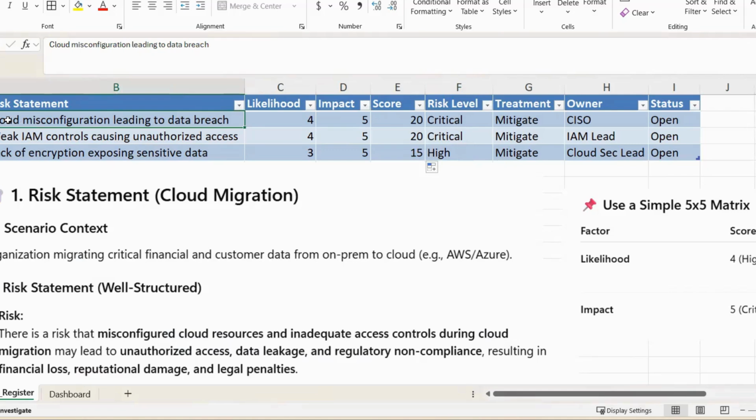In addressing these risk scenarios, you could also transfer the risk, where you implement cyber insurance coverage for cloud incidents or third-party shared responsibilities. And by doing this, you're reducing financial impact, not the likelihood. If you decided to go to option number 3, which is risk avoidance, then you delay migration of highly sensitive workloads, and that is really practical, as this normally conflicts with business objectives. Or you could move to option number 4, which is risk acceptance, which is accepting minor residual risk after controls are implemented, and this must be approved by senior leadership.